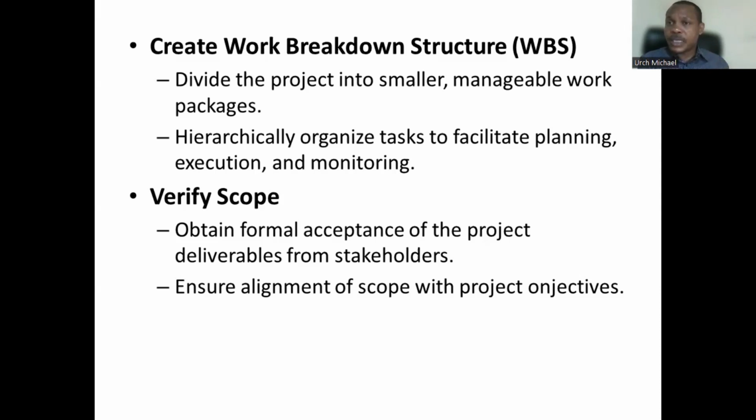Then once the design is done, the next thing is, maybe, we're going to start off immediately with project execution. Then we're going to start with the site analysis and all that. So that's the next phase of the project. You analyze your sites, you look at the runoffs, the slope of the sites, the nature of the soil, the bearing capacity, you do all analysis in your project. And then at the end, you come up with a concluded analysis of the site, and then you can now start up with the earth moving works.